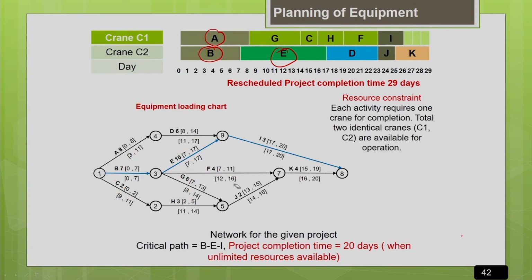So now let us mark which are all the activities completed. A is completed, B is completed, okay, E is completed. So now after A, we are going to see the allocation. Which are all eligible after A? Obviously your D is eligible for allocation. Then F is already waiting, ready for allocation, G is ready for allocation, C is also waiting for the allocation. So now let us see D, F, G and C are ready for allocation.